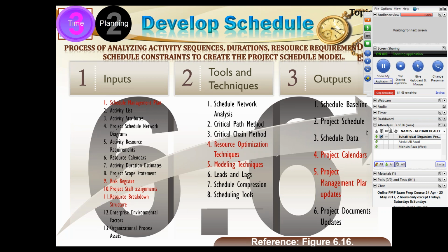And that 1 day which has been taken away is not considered part of that activity anymore. And the project manager has created it as his own buffer, and that buffer is the protection the project manager has. So if these people on the critical path cannot complete the work in 54 days, I still have 5 days in my buffer lying.